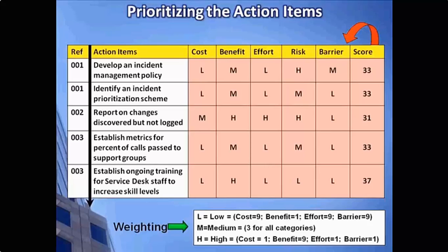It is recommended that this be done first by those doing the assessment, and then through workshop settings or special meetings, interviews, or focus sessions, reviewing what the assessor came up with and modifying it, taking into account comments, opinions, and observations by the rest of the assessment team and stakeholders.